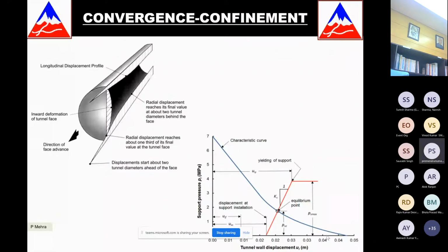Now, when the TBM goes ahead and there are deformations behind, in case there are too many deformations, this cutter head is of a certain dimension and the teeth of the cutter head are on the front. So there is no way for this machine to come back. Now, in shallow tunneling, when this gets stuck, we can still take it out with a shaft or an adit. But in deep tunnels, if this happens, then the only way to take it out is to go behind somewhere, do a drill and blast tunnel, come ahead, find where the cutter head is, try and take it out, probably do a bigger opening and then push the machine ahead. But pushing machines ahead itself is not very easy.